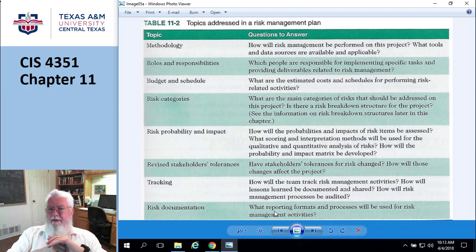At the end of 2 hours, I need to decide: am I going to continue this, or am I going to roll back? I'm going to have a fallback plan. My fallback plan basically means I'll do a backup of the server, and then I spend the amount of time, and if I get to some point where I go, this is just not working, I could spend another 5 hours and maybe I can get it to work. But maybe I need to execute the fallback plan where I put everything back the way it was and then spend some time later. So fallback plan is all about how to reverse what you just did.